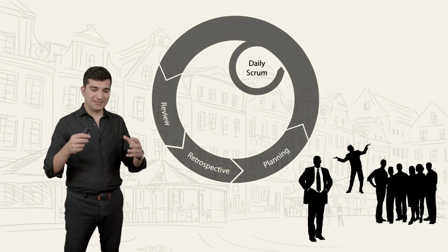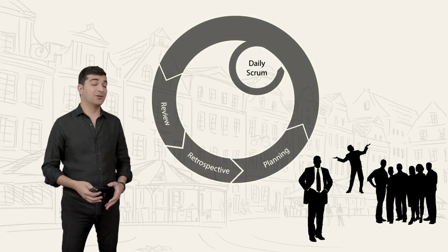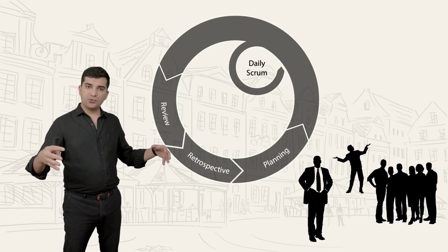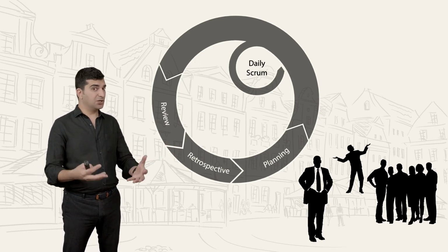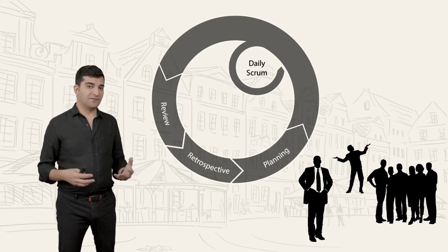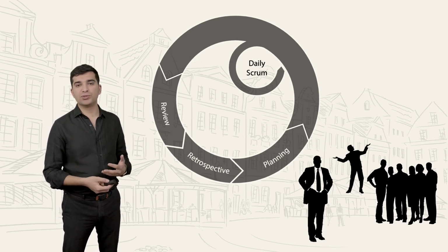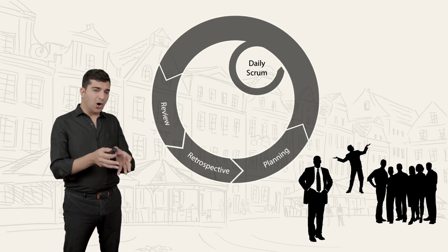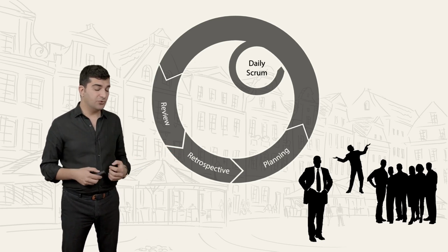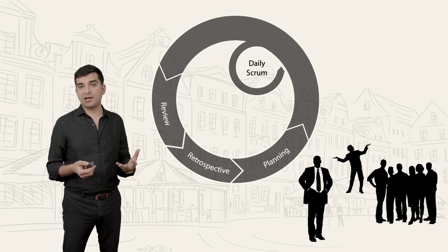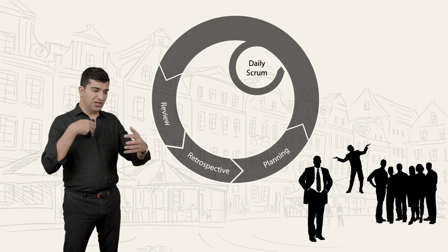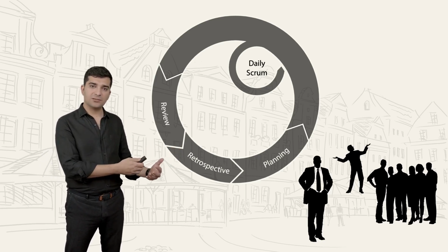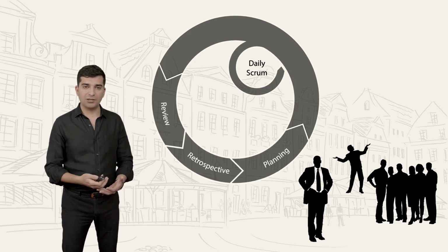Alright, you remember that we don't create a complete product backlog in the beginning of the project. That's upfront planning. We do it gradually during the project, especially based on the feedback that we receive from the customer and end user representatives and everyone else. A part of that feedback comes from the sprint reviews, but we can still have feedback at other times. So as product owners, we need to constantly update and refine the product backlog.